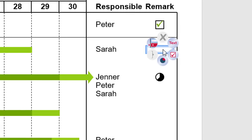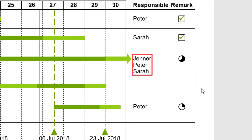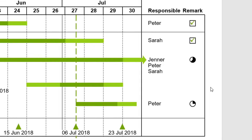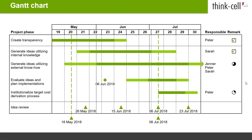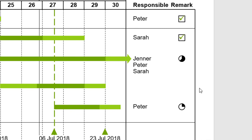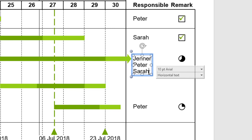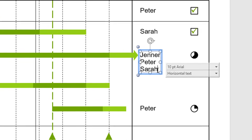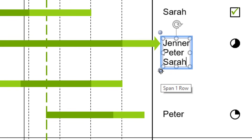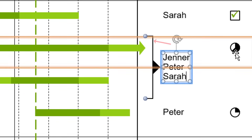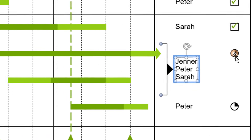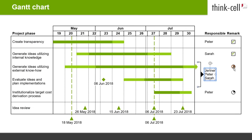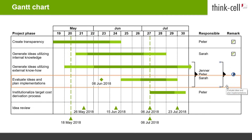When you fill your remark and responsible column, you may want to apply a text label or an ideogram to more than one activity row — for instance, because a team or person is responsible for more than one activity in your Gantt. In this case, you can make the label span two or more rows. Select the label by clicking on its frame — one drag handle appears above and one below. Click on one of the handles and drag it to the desired row position. A bracket is inserted to show that the label entry refers to a group of rows. Repeat this for other text labels, Harvey Balls, or checkboxes if needed.